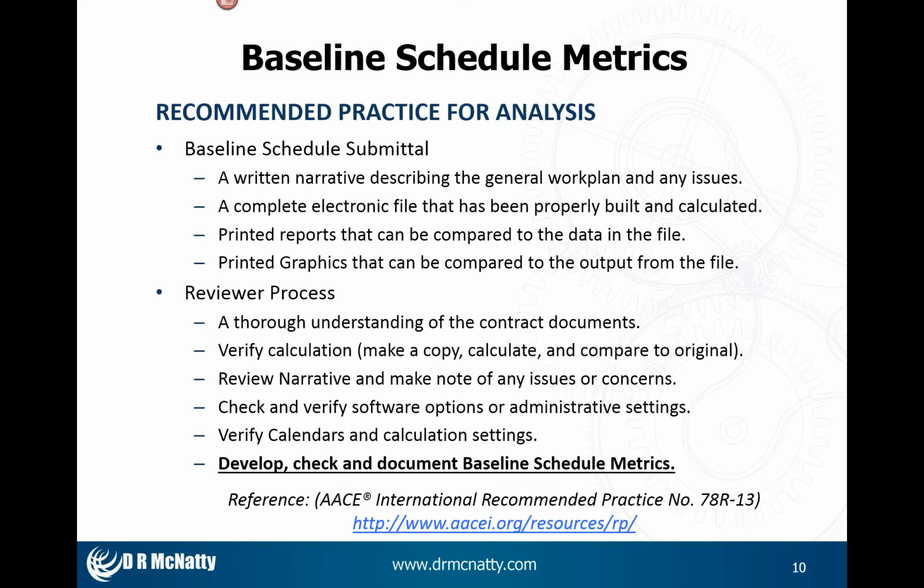I then check and verify the software options, simple things like changing the calculation mode from retained logic to progress override could have an impact, not on an original baseline, but on subsequent updates. It could very well have an impact. And most of all, I need to verify the calendars and make sure that when I imported the schedule that I didn't use some default calendar that changed what was on the import.